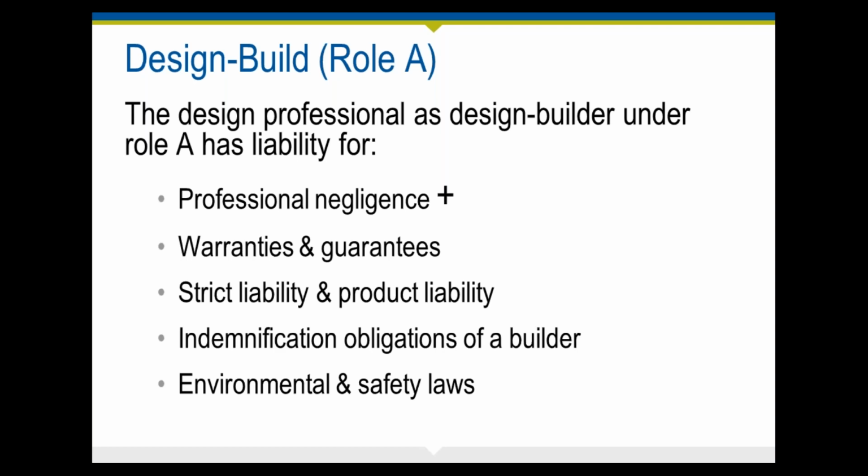So you're also responsible for the indemnity obligations of a builder. And there may be strict liability and product liability exposure, as well as increased exposure under federal and state environmental and safety laws and regulations, because you're now acting as the contractor who's assumed responsibility for the site and therefore is expected to own the project.